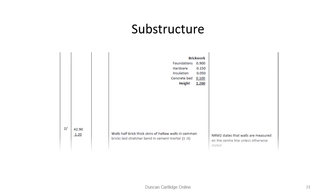Now to the masonry. I would also recommend reference to the masonry video tutorial. Once again, we can use the mean girth for this item. Because the wall comprises two skins or leaves of brickwork either side of the centre line, we can use the mean girth and multiply by 2. The height is calculated from dimensions on the drawing.